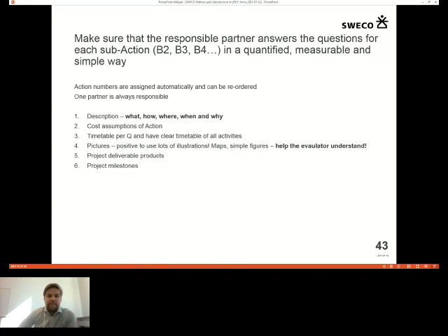And finally, the project milestones. In a LIFE project, they do not need to be a specific product. They should more split the project into different phases. So for example, that the installation phase is over. The deliverable will be, for example, an installation inspection by some authority that needs to look at it before you go to the next phase. And the milestone would be installation phase finished.